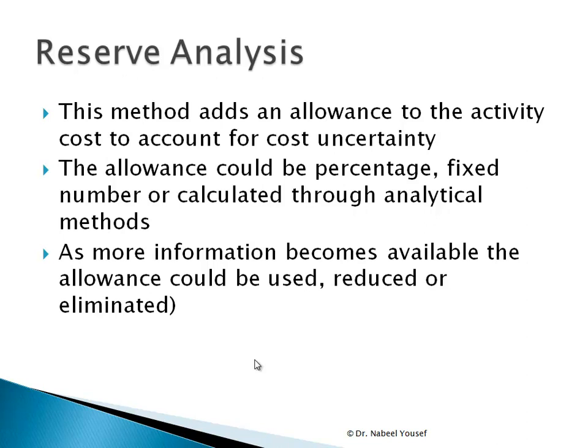Having the reserve, if you want to be conservative and add a lot of reserve, then that might affect the total project budget, and that might affect the acceptance of that project by the management. So actually you have to be careful when doing the reserve analysis to make sure that the allowance is an acceptable number or percentage that can be added to the cost of each activity.